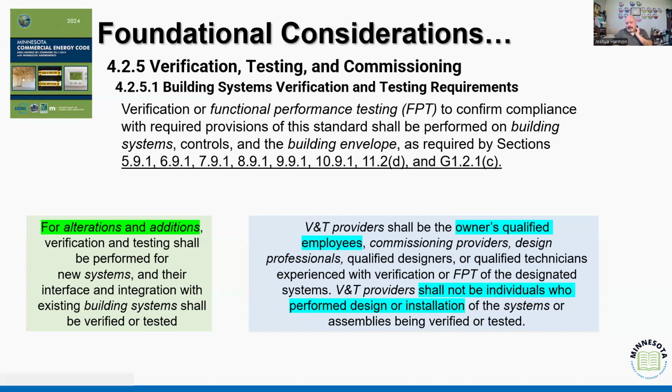Now, what I do want to verify and point out is what the code says about those verification and testing providers, right? What it recognizes is those people are employees or qualified employees of the owner, right? And as we see here, those providers shall not be people that performed the design or installation, but if they're properly qualified, they could be employees of the company, right? You don't have to have a third party come in, right?